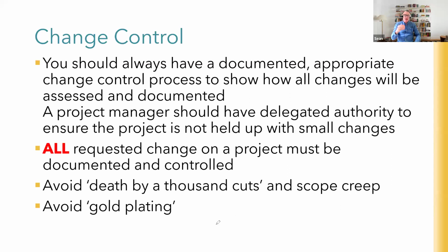Scope creep is undocumented changes to a project. It's not just changes to a project, because I've had one person tell me, well, scope creep just means any changes. Change happens. Change is normal on a project, absolutely. Scope creep is undocumented. You know, those verbal handshakes and agreements that 6 months down the track everybody disagrees with because you agreed to it verbally. Scope changes should be documented to avoid scope creep.